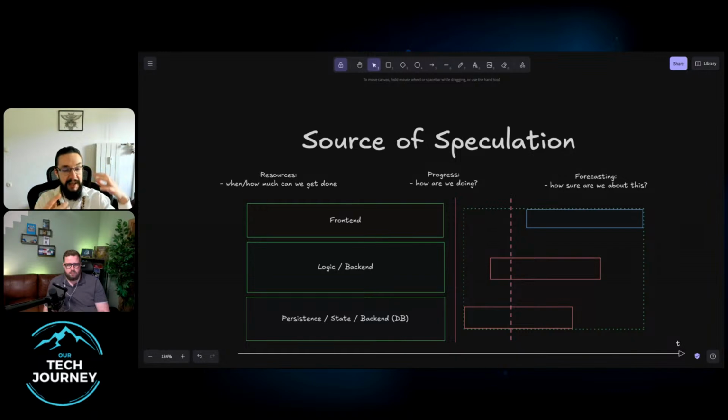That's what happens when you slice work horizontally and you plan it like this, and then somebody has to walk around the room, walk around the organization, and pull these timelines together. And that is purely speculative right now. And it creates more work, because normally the deadline, which is supposed to be somewhere there at the end, is still there, but this overhead of translating from the old requirements to the new requirements is actually extra effort, which is stacking up if you have that daily, right? Exactly.